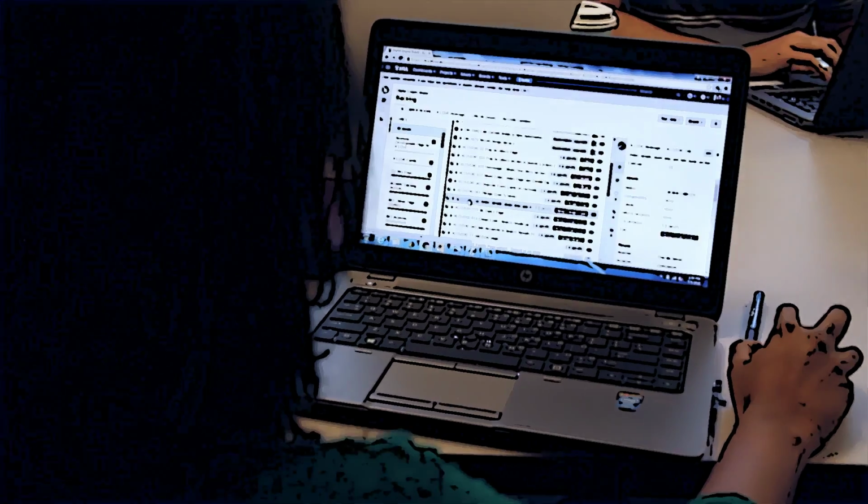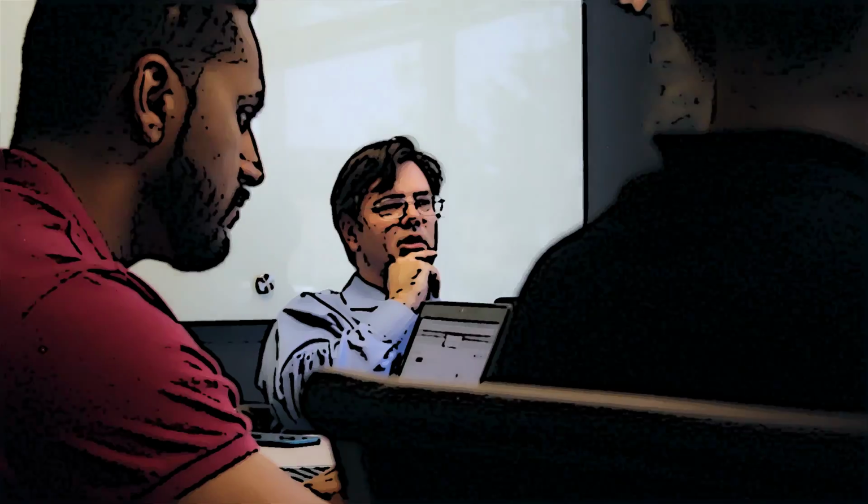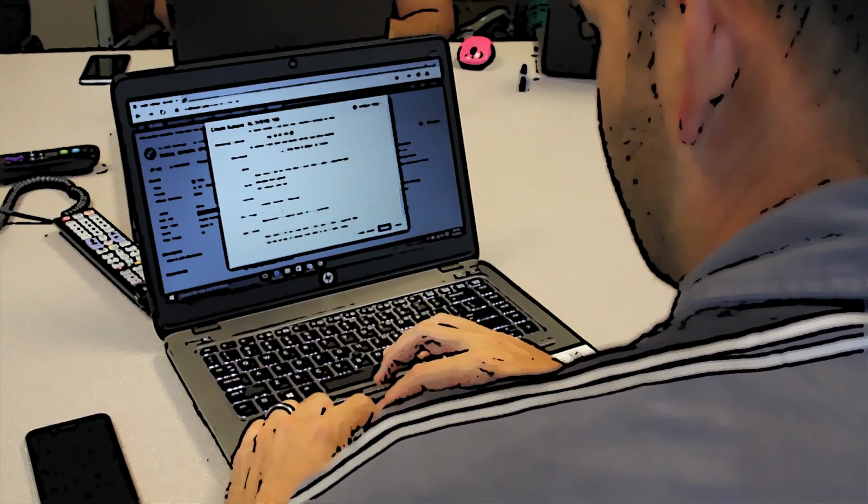Next is the planning meeting where the team determines just how many points they want to complete during this sprint. Based on the business priorities and the estimated points for each task that was completed in the grooming meeting, the team chooses which tasks to complete during this sprint. Tasks are assigned, and the team gets to work.